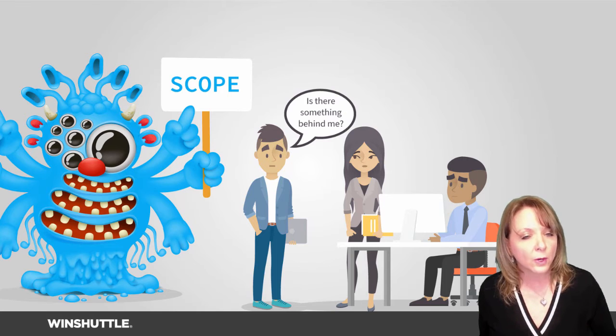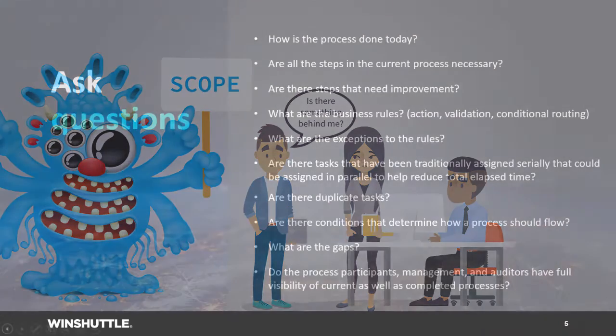That's why the more workshops you can have and the more discussions you can have in the beginning to really understand that process helps to reduce the amount of scope creep. I think some amount of scope creep is reasonable, especially if the users can automate some things they hadn't thought about before that they're doing manually. Then that certainly is worth taking a look at.